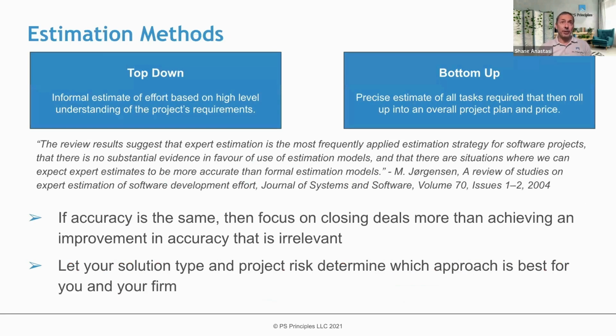So let's look at an example here. One of the examples that we see most commonly, and I was guilty of this early in my career as a PS manager, we get involved in the sales cycle and the sales team is trying to sell a deal. And what we want to do is get down and do that bottom-up estimate. We want to get all the detail, drag out all the skeletons from the closet, and build that project plan up with an infinite amount of data. But here's the problem. That just takes an enormous amount of time.